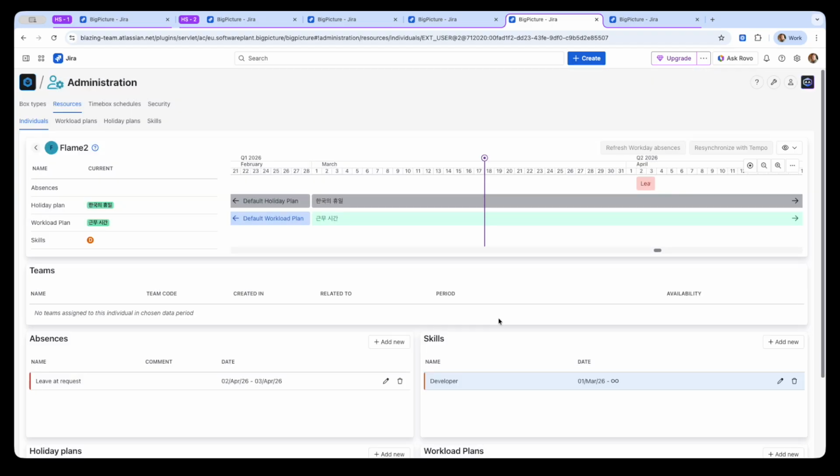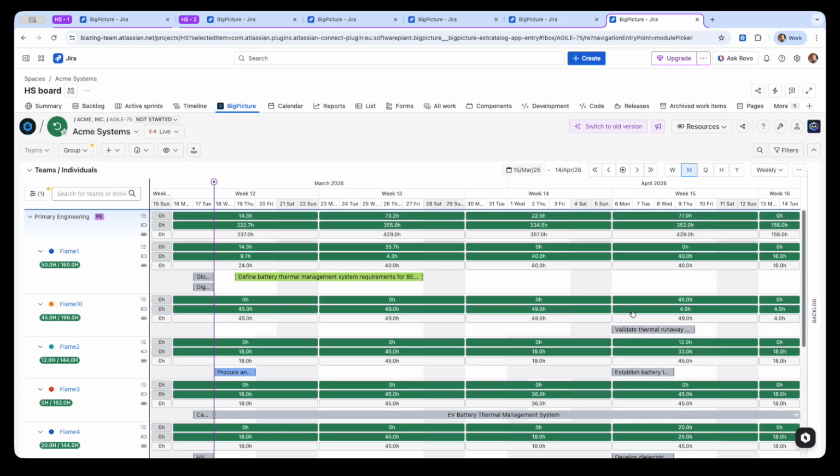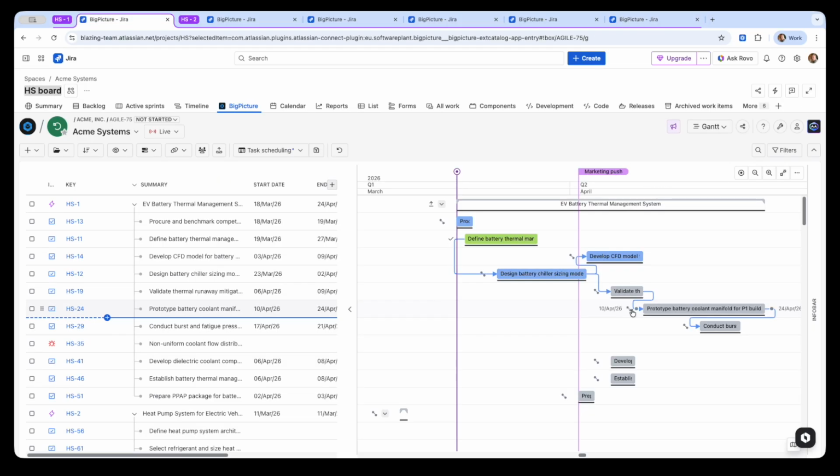With all of this in place, now we understand why our team member on this task has limited working time during our target week. To resolve, we'll reallocate things to another person. Much better. Returning to our Gantt chart, let's now pull forward those tasks needed by the CMO. Perfect. All set now.